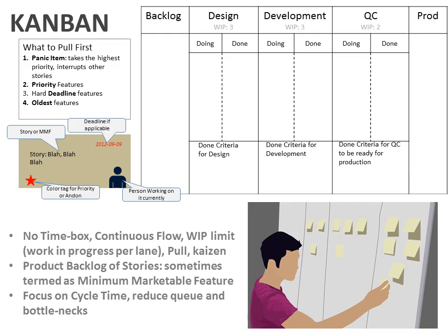Okay, so let's look at another example of the key components of a Kanban board. There is the backlog. There can be a list of goals on the left hand side. Then there's the design, development, QC. Those are the three criteria or three lanes that are defined. There can be more than those. Each has a doing and done state.